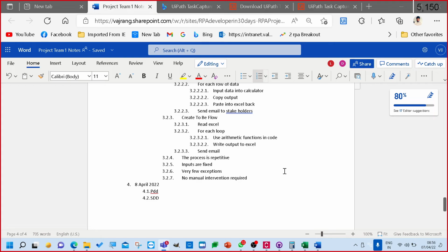So what exactly you can answer is, after every 15 days we will have a sprint review where we need to demo our product and show it to the stakeholders. Once that is accepted, and after the testing is done, we will go for a deployment. For that, there is a separate team who does the deployment because we don't have the access for production machines.